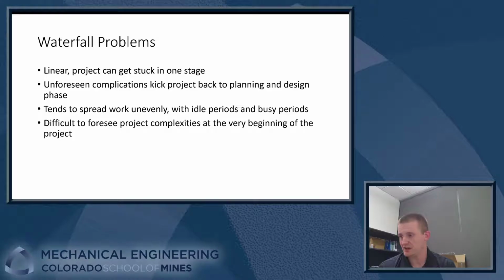Which sounds like a good idea in theory, but the problem is at the beginning of a project, that's when you know the least about the problem that you're trying to solve. You're going to be learning about that problem all throughout the project, and if all of your planning is done before you learn most of the critical knowledge that you need to know to complete the project, it makes it very difficult to make a realistic plan of how to get the project done.